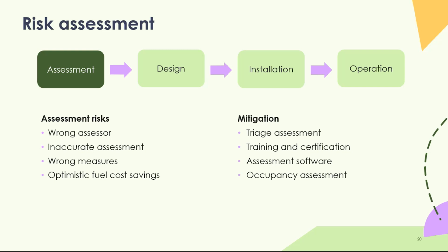Having the wrong assessor, or an assessor that's not knowledgeable enough dealing with particular stock, can be a particular problem. I know this because I used to work at Cardiff Council, and we'd have to brief some of our EPC assessors, for example, on the specific stock types that we had, so that the information we got back from them was actually useful and not some garbled mess, which is a particular problem on EPCs, admittedly.